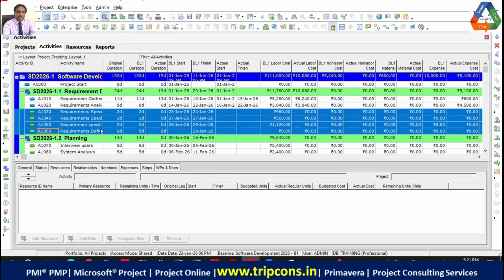We are going to update these 4 activities at once because, guys, remember, when you finish with variance, you have to update the activities individually. When you have finished many activities without any variance, you can update them at once, as a bunch, right?